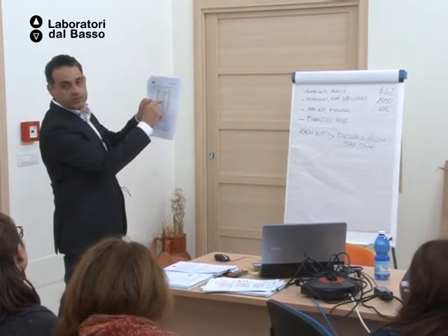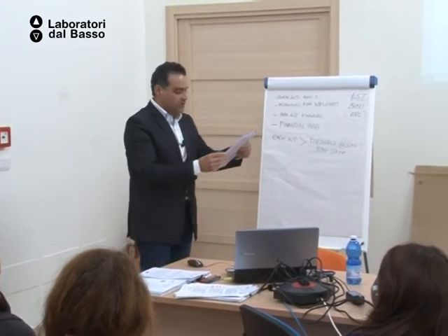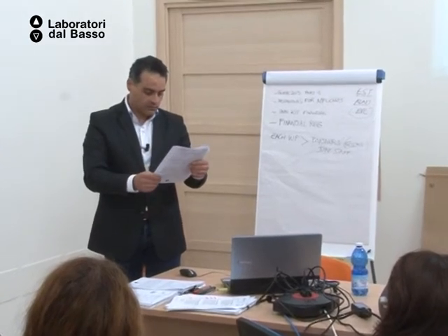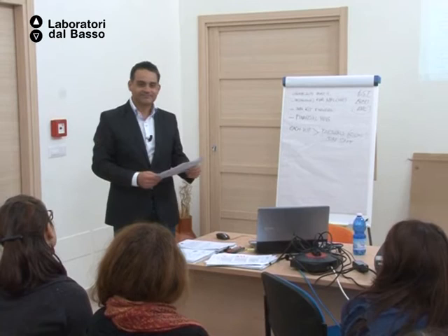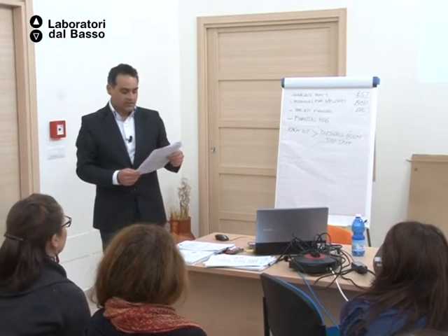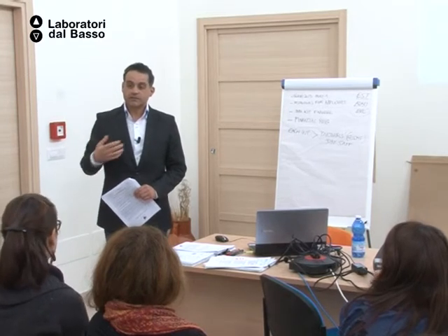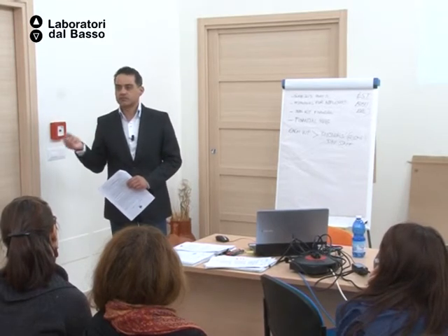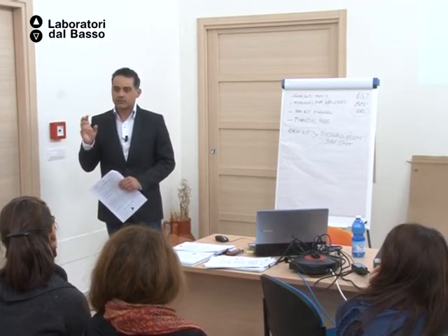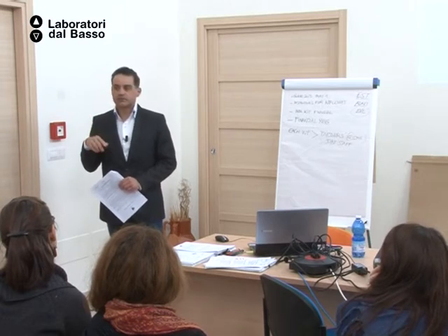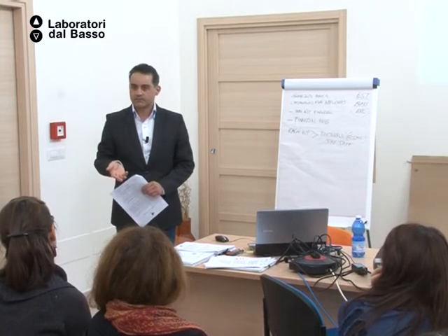So you see the 232 euros per day in Belgium, and if you go to Italy, you can consider €247 per day. It's a good thing. In the north, it's okay. It means that if I have a journey to realize in Italy, and two of my staff will have to go, I consider 247 euros maximum would be the top amount that I might receive for my staff. But obviously I know what I'm going to need, because I'm working with real costs. Okay?